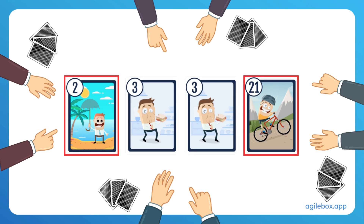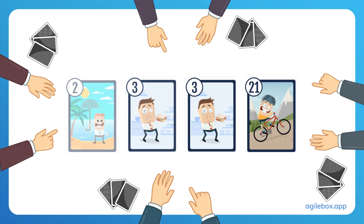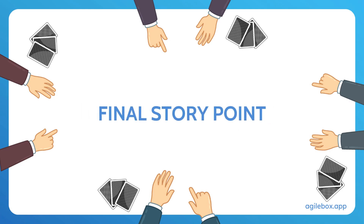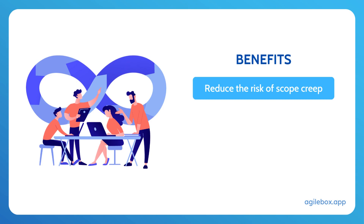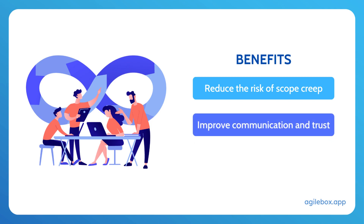If there is a wide range of estimates, the team members with the highest and lowest estimates explain their reasoning. The team then has a brief discussion to reach a consensus. The estimate is then used to plan the work and allocate resources accordingly. Planning Poker is a simple and effective technique that can help reduce the risk of scope creep and improve communication and trust within the team.